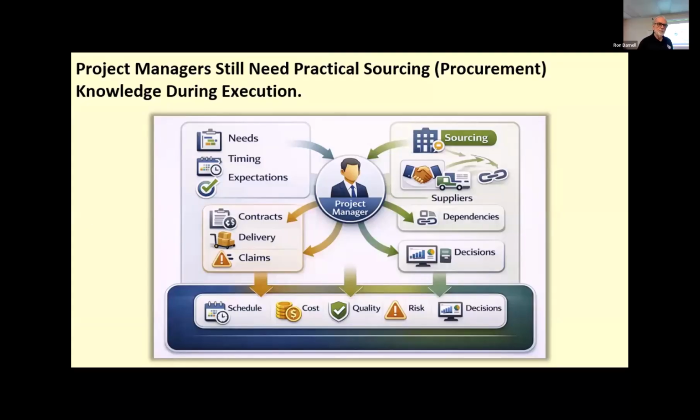It's sort of always been this way in practice, where we had to depend on the sourcing group, whatever they call it, the contract administration folks. You're always relying on them, but the accountability always fell on the project manager. Now they're splitting that up, and your responsibility is to coordinate, but they're going to be accountable for making sure the contracts are executed. So it's helped position that accountability, but it's still a shared idea.